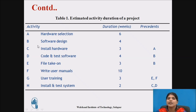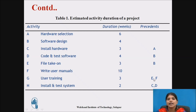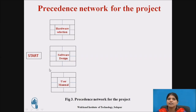Activities A, B, and F have no precedent, meaning they start immediately. The remaining activities — C, D, E, G, and H — have different precedents. For example, C has A as a precedent, meaning whenever A has finished, C can start. For G and H there are two precedents: when E and F have been completed, only then can G start.